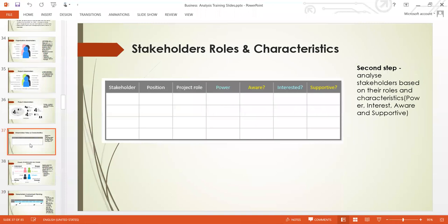Then the second thing after grouping them is to analyze them based on their roles and characteristics, which is power, interest, awareness, and supportiveness. Looking at this table, you can see here the stakeholders. That's where you list the stakeholders by their names. Then you list them by their position in the organization. Then project role, you list them by their roles within the project. Then here you list them by the power they possess. Either they are very high powered or very influential, high power, low power. You list them here. Then here is based on their level of